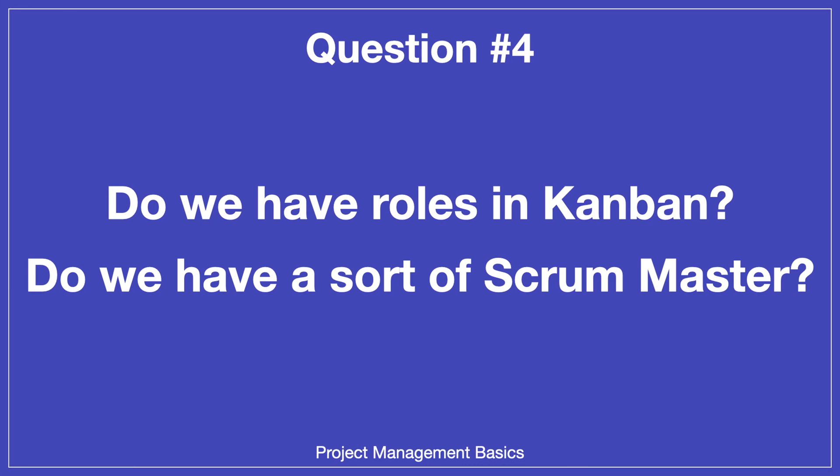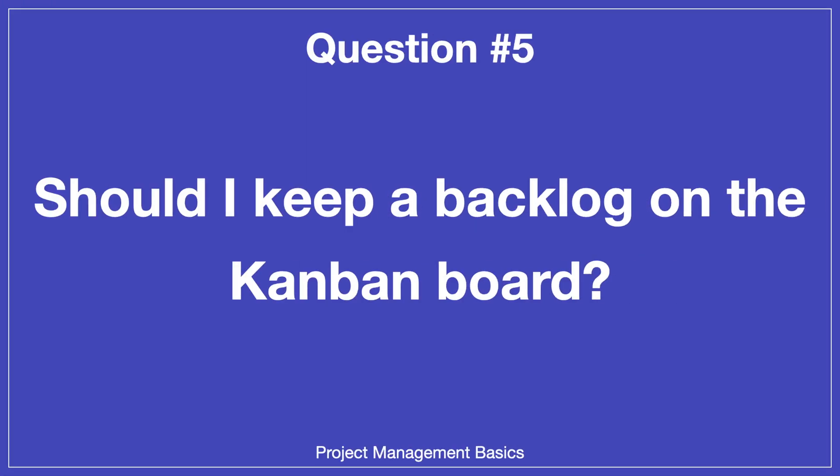Do you have roles in Kanban — specifically, something like a Scrum Master? Kanban doesn't specify any roles at all, so you can use it with any team in any industry. The only implied requirement is that your team should be able to handle all the work required to finish a task from start to finish. However, you also need someone responsible for prioritization of the backlog. As for keeping a backlog on the Kanban board — it's up to you. In pure Kanban there is no separate backlog; everything starts and ends on the board. I prefer to hide the backlog so the team won't be distracted by numerous tasks and can focus on already-prioritized work.